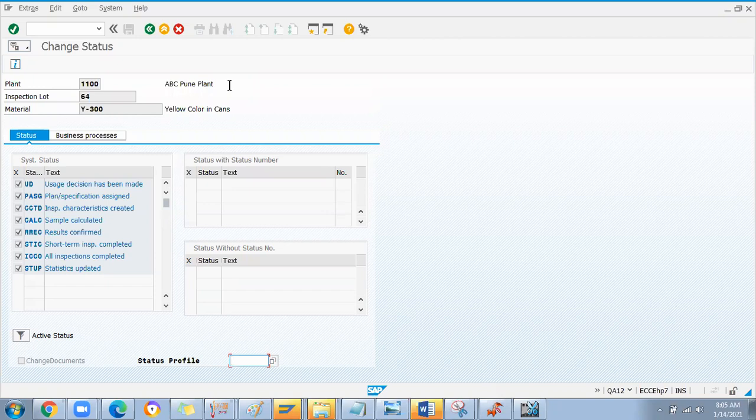So the procurement engineer will have that pressure to handle such kinds of stocks. The production people will be pressurizing, give me material today, 10 numbers, but this buyer will be struggling to get the material from the vendor side. Even after receiving the goods from the vendor today, the quality team will not do the process on the same day. They'll take another 1 or 2 days.